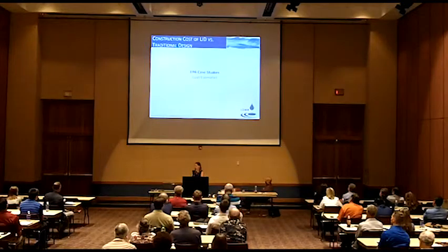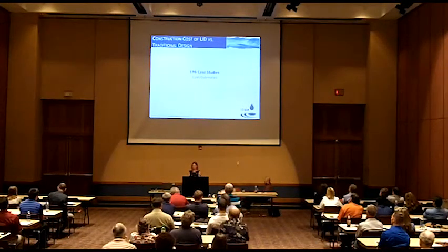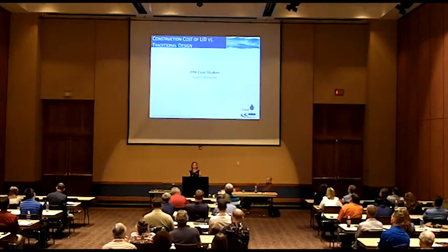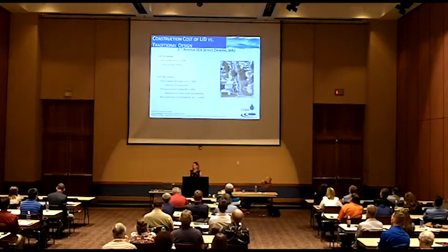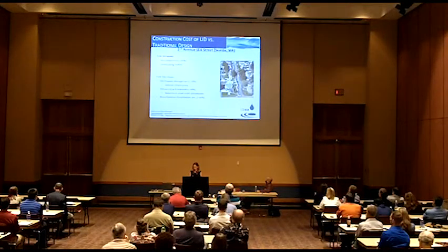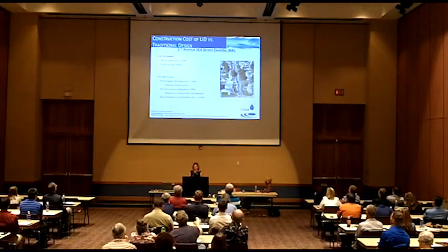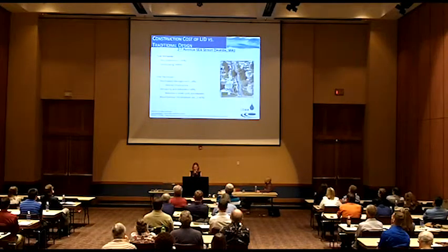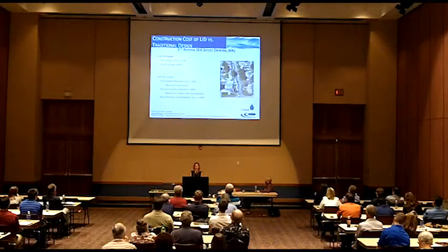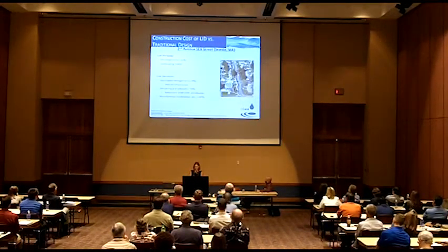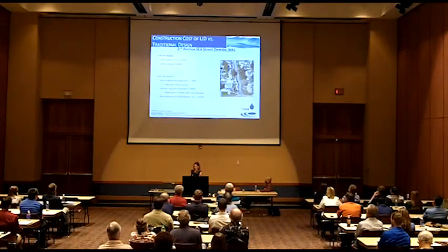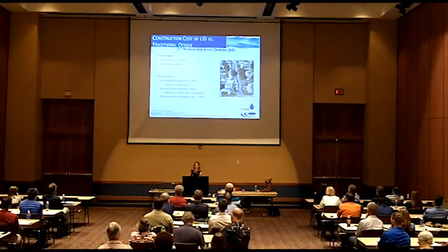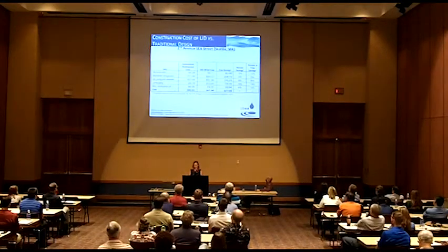So for the EPA studies, these cost estimates, Seattle. Some of the cost increases there you see are site preparation and then landscaping, 35 and 45%, but those were mitigated through some of the decreases in infrastructure, the reduction in street width and sidewalks, and also some miscellaneous costs such as mobilization.